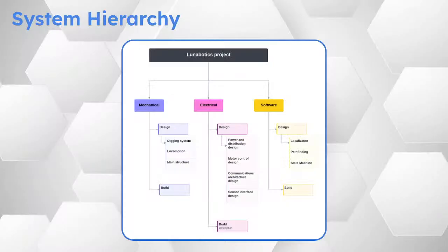Okay. So as a systems engineering competition, you are required to use a systems hierarchy. Basically this is a chart that helps you visualize where your control gates are. Control gates are basically what you use to decide if you are ready to move on or not. So you start off with the SSR, which is basically just the conception of the Lunabotics competition project, the idea that you are going to compete. And then you move on to design and just thinking about design. That's where the PDR comes in. And right now we're right before the building phase, which is the CDR.